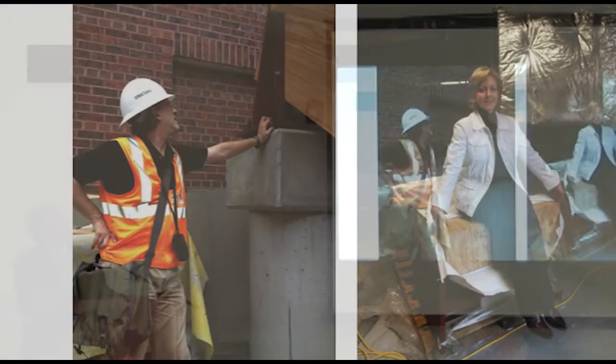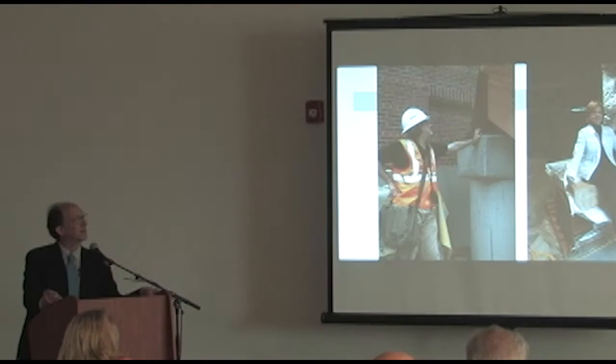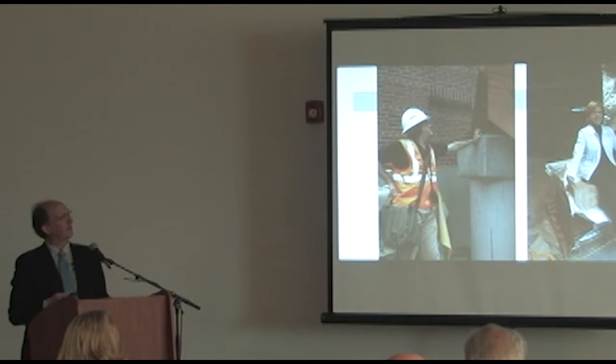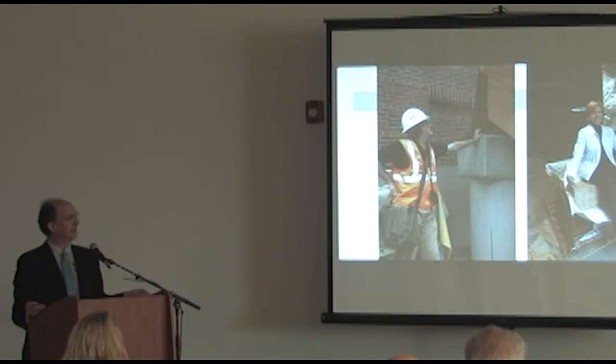We wanted to know what the finishes were going to be like, and how the details were going to come together. This whole thing had been modeled in BIM and massed, but there were still some components, like the finish of the concrete columns and a lot of the roofing details for the roof, the gutter and the skylight, that all had to come together. So we did this full-scale mock-up. It's down on the ground where everybody can come up and see it. The owner in particular can come see what they're going to be getting a few months later.